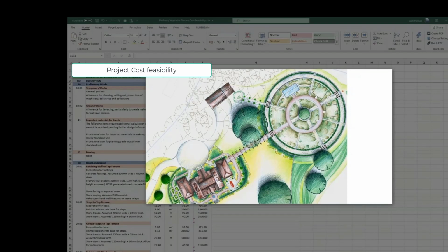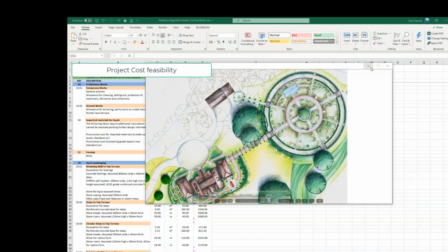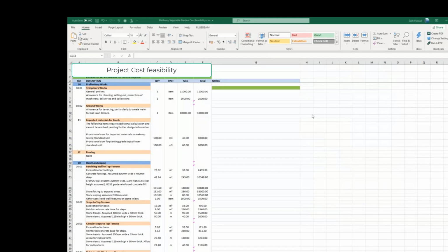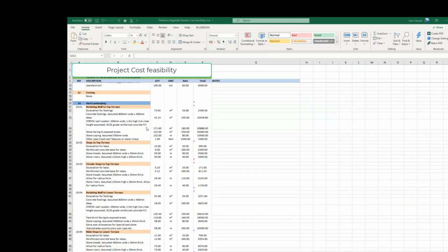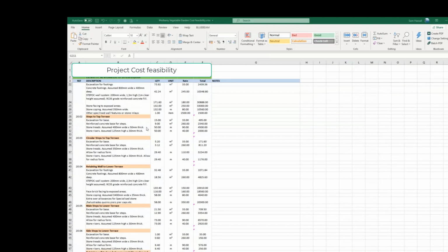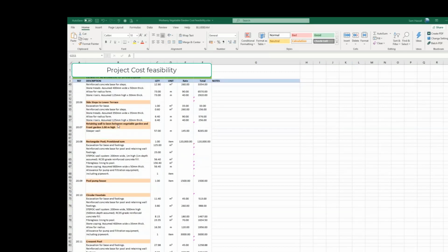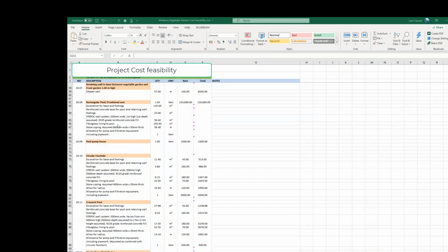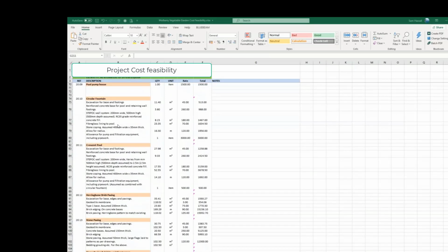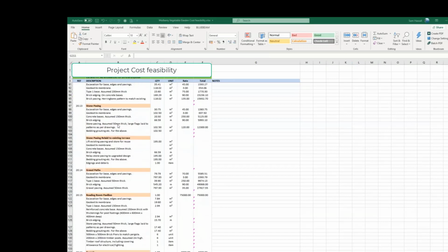And we would have broken that down, and this is the method that you should use, and the only method if you want to extract cost, is to break things down into as many granular areas as possible. So you measure and you make line items. It's a tedious job. It's not fun, but this is the way you would extract a budget for the job. So getting granularity in the job is the way that the budget would work out.